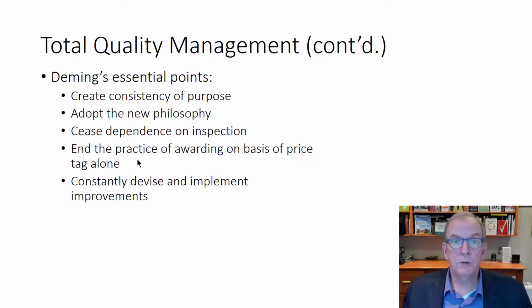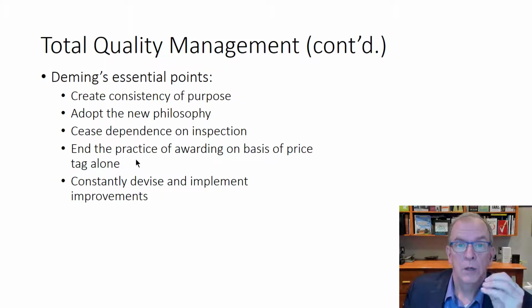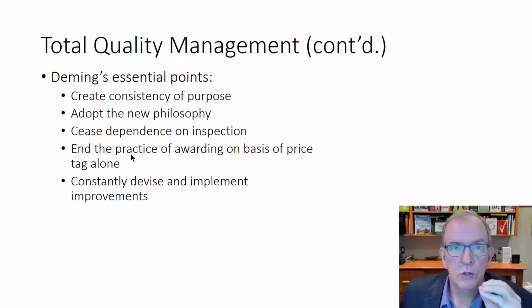But as we talked about when we talked about subcontractors, pre-qualifying, making sure that the people you're accepting the price from are well capable and have the tools and expertise to do the job. So that's different. We pre-qualified people that we know can do this work, and now we're basing it on lowest price. That is okay. What's not okay is somebody just decides they want to put in a bid, and just because they're lowest and you really haven't verified whether they're capable or have the skills to do it, you're probably going to get what you pay for in that case.